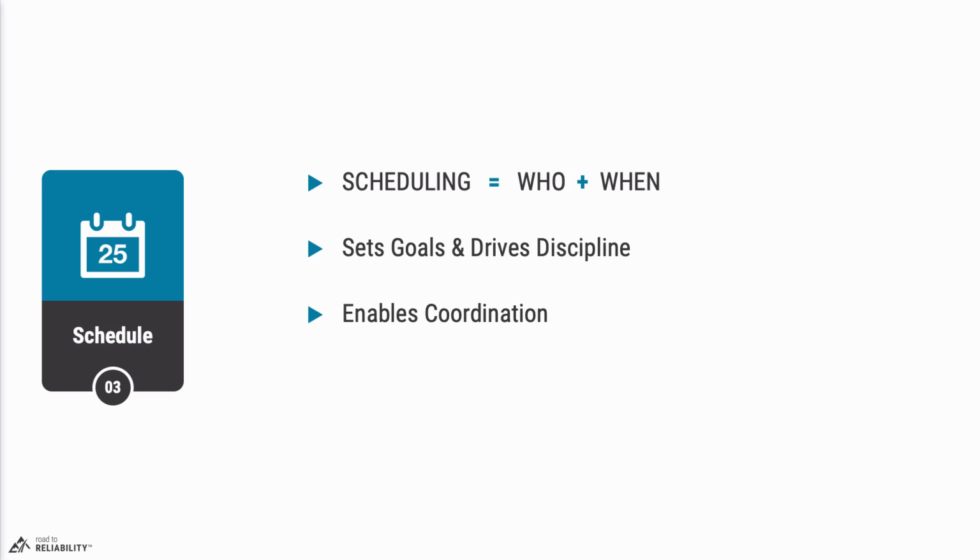Coordination between trades, to make sure the electrician required to isolate the electric drive associated with the pump is there on time so the mechanical technicians don't end up waiting 2 hours for an electrician. Scheduling enables coordination between maintenance and operations so that there is an agreement up front about what equipment can be taken offline and what can't. You don't want to have that conversation during the week when the job is about to start, because your technicians will be waiting around and wasting their time.